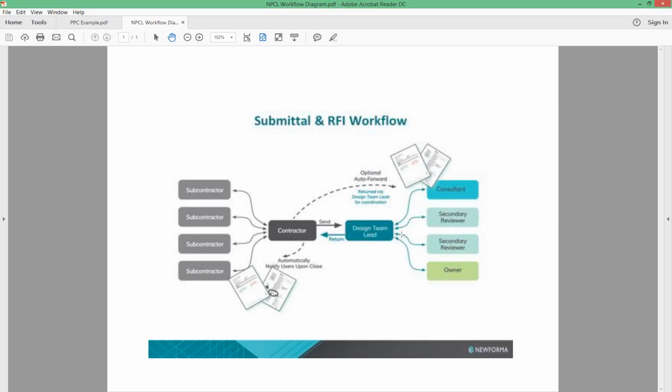And so to your question about how you control the electrical submittal going to the electrical engineer, you've got two options. First is that whoever you have at this point in the process, they're going to do the filtering of, wait, somebody put the wrong information in, didn't look too closely at the specs, whatever it is. It's don't show me how the sausage is made, just send the right things over to whoever's doing the reviewing, so that they only have things on their plate that matter. By default, it's going to go to whoever is in this spot, and then they'll quarterback it out to the appropriate people. But we recognize that can sometimes be a bottleneck.